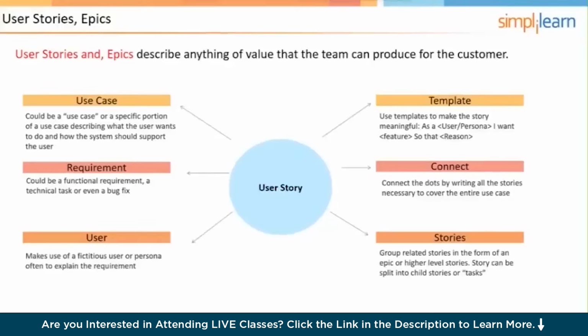And a reminder, when we were talking about the sprint planning meeting, we said it has two parts to it. The first part is selecting all of the user stories that are going to be included in the sprint, and then disaggregating each of those user stories into tasks. That's done in the sprint planning meeting, and then those tasks are the things that are actually done when the work of the sprint begins.